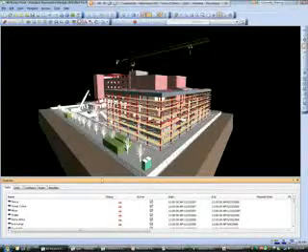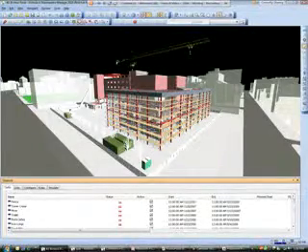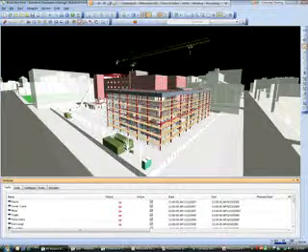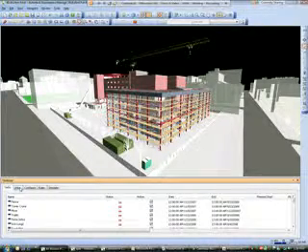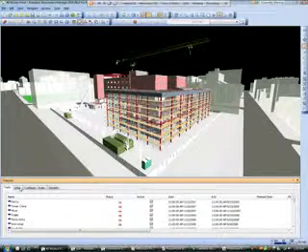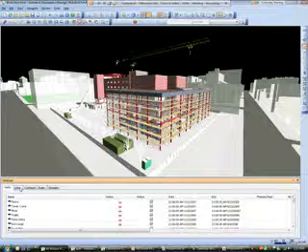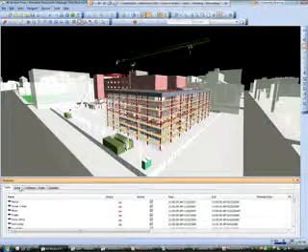Through the same process, I've gone out and I've linked out to my project schedule. This is a Primavera schedule, but the nice thing about Navisworks is that we can link in multiple schedules. So if our project schedule doesn't have things like the logistics planning or some of the other items, maybe 2-week, 3-week look-aheads from some of our subcontractors, we can take all this different schedule data, link it all together in the model. So this becomes useful. It keeps your project schedule relatively free, and most owners, most contractors should say, really don't like to put more on the schedule than they need to.